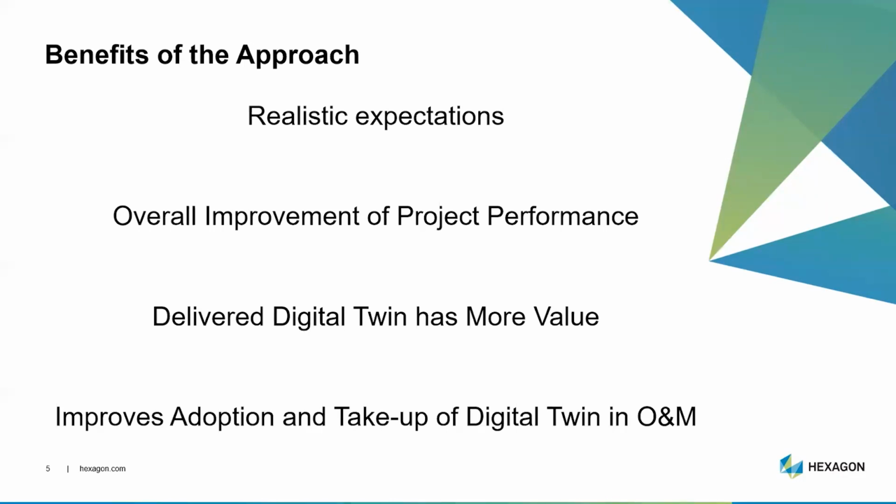We start to take the concepts of AWP, which is focused at improving efficiency in construction, and taking that, twisting that, and turning that into, okay, how do we more efficiently execute on commissioning our plant? And how does that in turn drive construction, which of course in turn drives our engineering and procurement? And if we can do that well, I might spend a little bit more in construction, but I'll more than save in what we're seeing in terms of commissioning time. So we see an overall improvement in our project's performance.